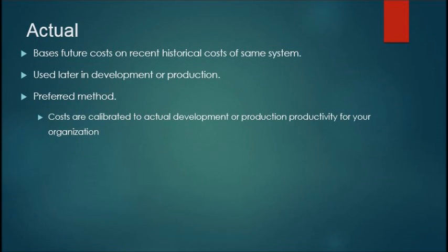Actual method bases future costs on recent historical costs of the same system. It is used later in development or production. It is the preferred method.